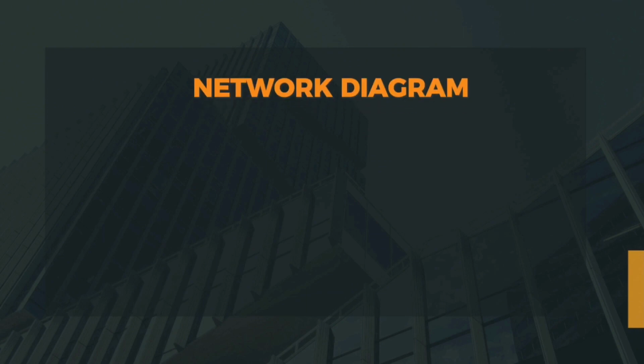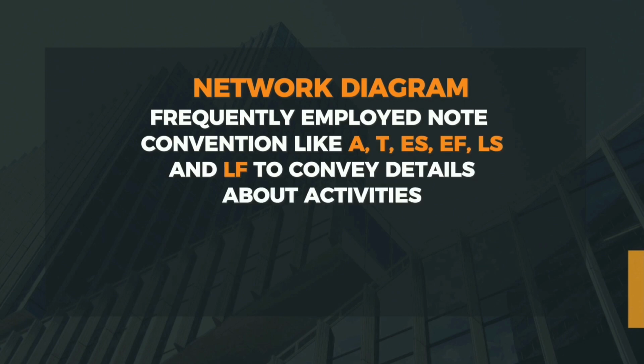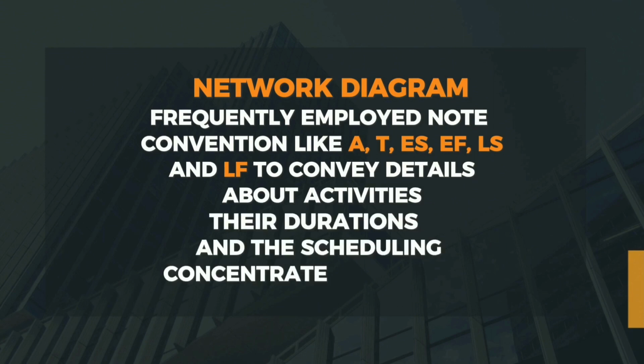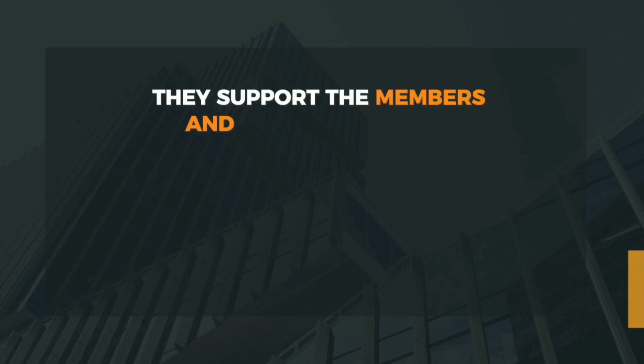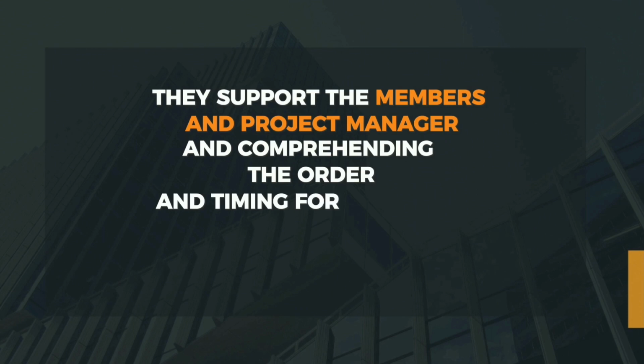Network diagrams frequently employ node conventions like A, T, ES, EF, LS, and LF to convey details about the activities, their durations, and the scheduling constraints associated with them. They support team members and project managers in comprehending the order and timing of project activities.